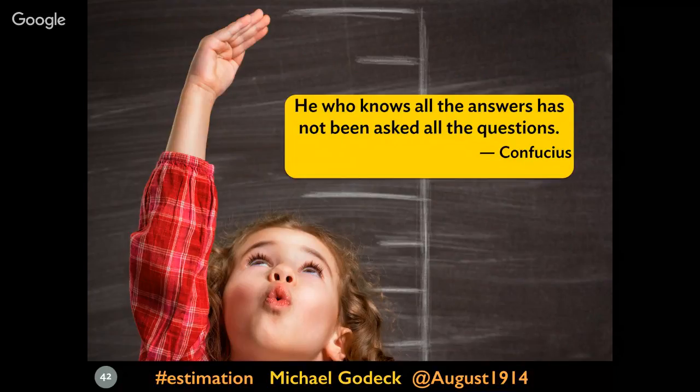And part of that time I lengthen the interview process with my clients, and I take the time to ask those questions. And since we're producing an output that everybody agrees on by the end of that week of discovery, it helps to clarify a lot of the areas where there could be confusion. If you actually produce a mock-up, and everyone agrees that's the mock-up they wanted at the end of the week, then that can really help to draw a line. You can't necessarily draw a line around a whole thing. So for instance, if you've got 12 months' worth of work and you only spend a week on it, you can at least draw a pretty good line around a core set of features.